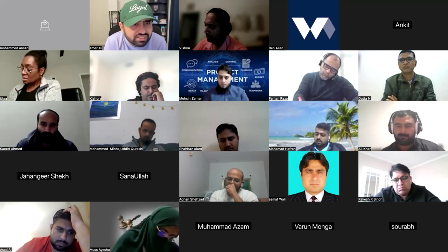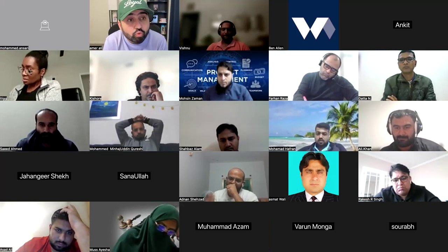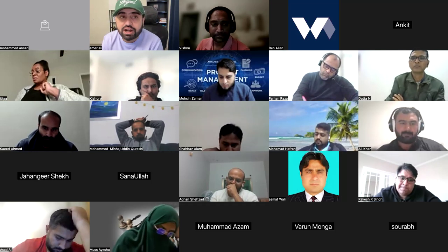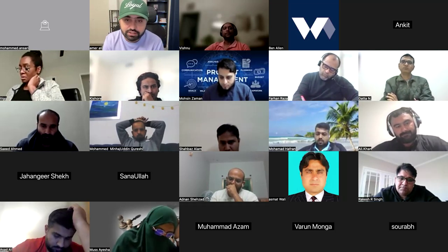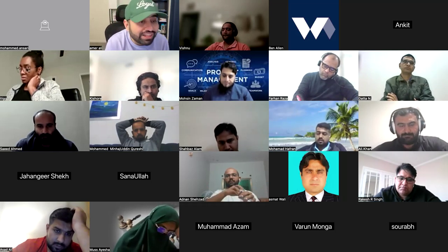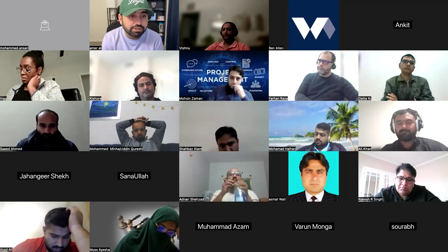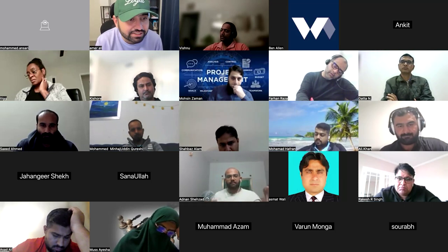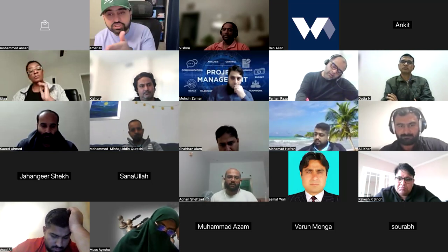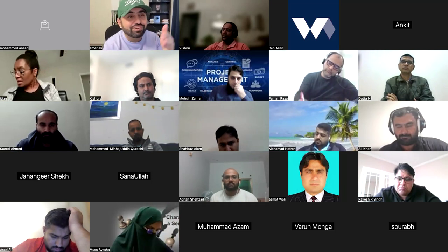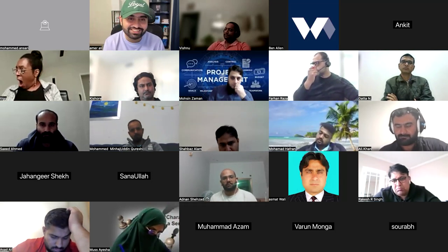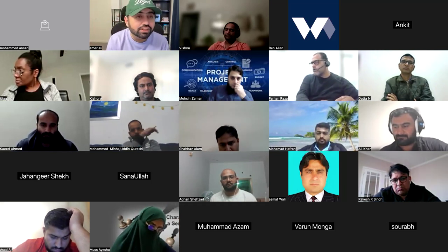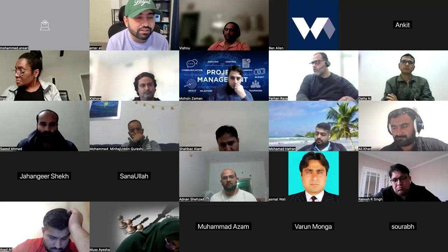Who needs the information? Who needs it? When they need it. Yes, communication, all the plans, Ahmed sir, are part of planning. Who needs the information, and when do they need it? Minajuddin, why do you need that information? Is the information confidential? How will the information be transferred, stored, and finally discarded? Every single thing about communication will be part of the communication management plan.